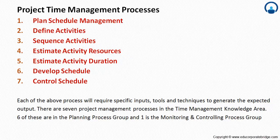You need to be very particular on this because there are close to 45 to 46 processes in total, and out of those, 20 are contributed by only integration management, scope management, and project time management combined. There are rest of seven knowledge areas as well, so these are very important knowledge areas of project management. Each of the above processes will require specific inputs, tools and techniques, and outputs to generate the expected output, as defined for scope and integration.